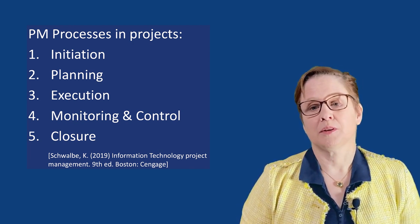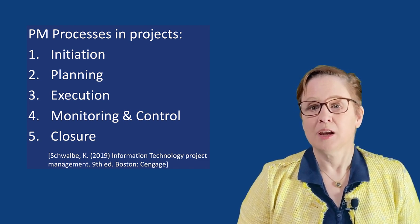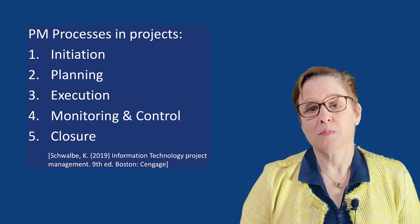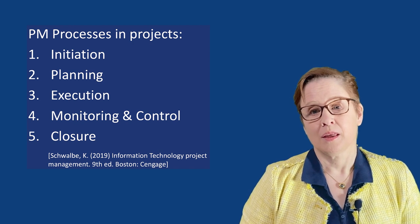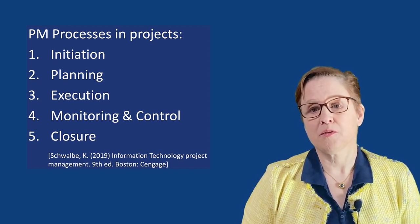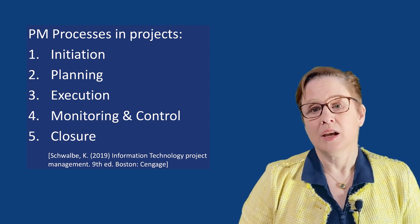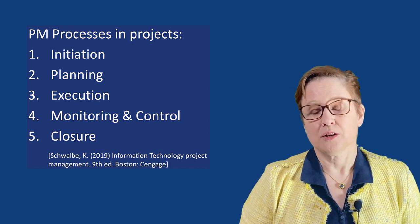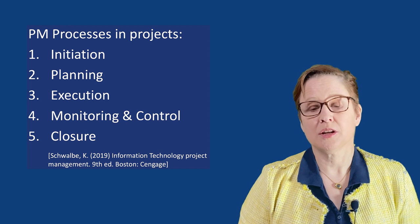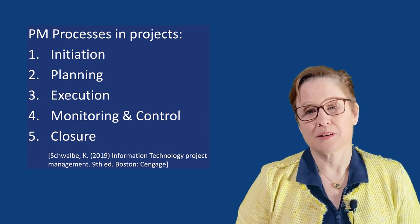And often in parallel with the previous, the monitoring and control phase, in which you monitor progress and compliance to plan, and where optimization, testing, error resolving and revision takes place. Finally, in the closure phase, you deliver or commission the project or process to the stakeholder, including all reporting and documentation.